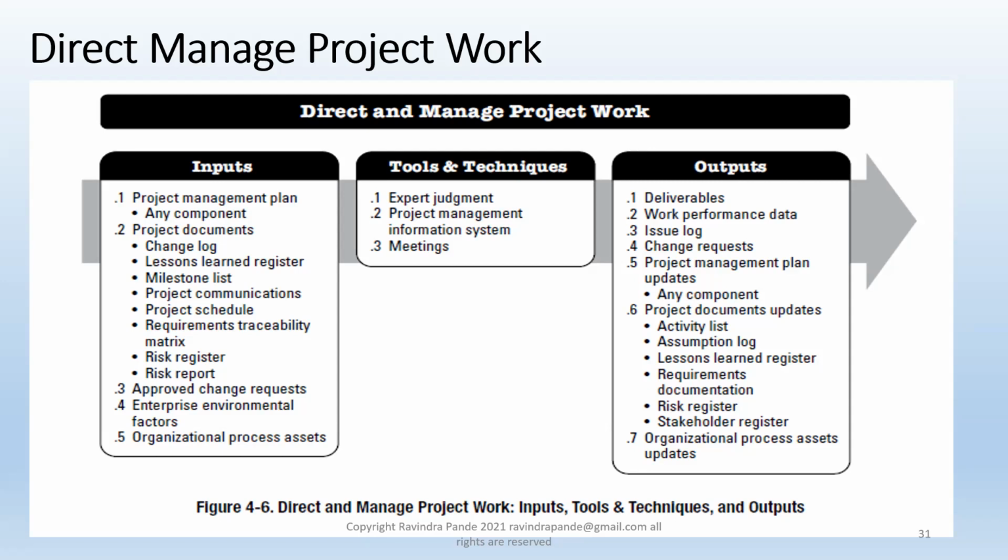Again, there's a body called the change control board, which can be a single person or multiple persons within the development organization. So it's with the organization which we are working for as a project manager. Now this change control board normally sanctions or estimates the work in terms of number of hours, number of resources required, skill of resources required, and the time needed to complete. Because whenever you add a new task, the overall project management plan gets updated accordingly.